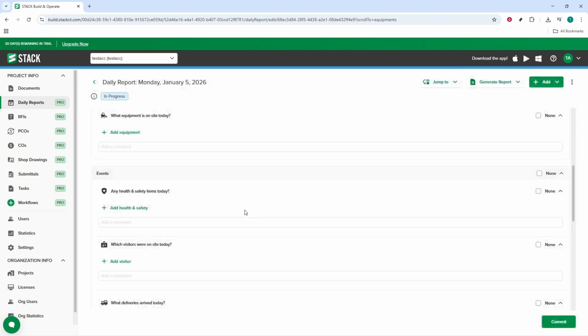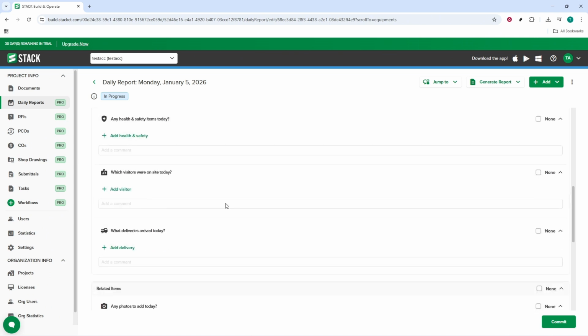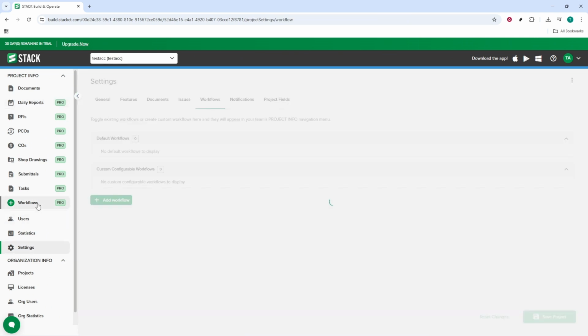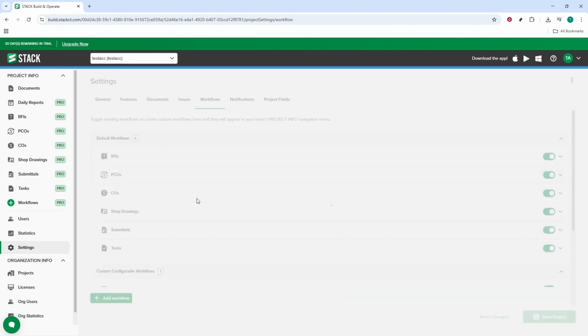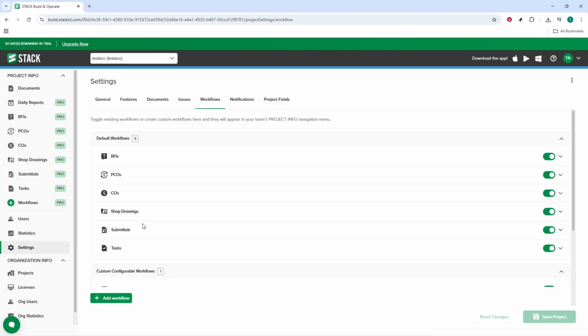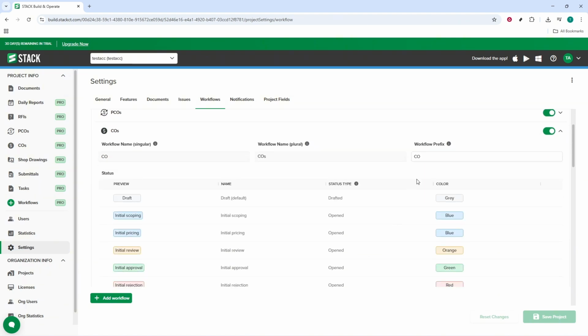Use workflows to keep cost-related tasks visible and moving. Create workflow items tied to the relevant cost codes and budget lines. Add planned start and end dates, assign a responsible party, and update status as work progresses. This keeps your schedule and your cost burn aligned so you can tell whether you're spending faster than you're earning progress.